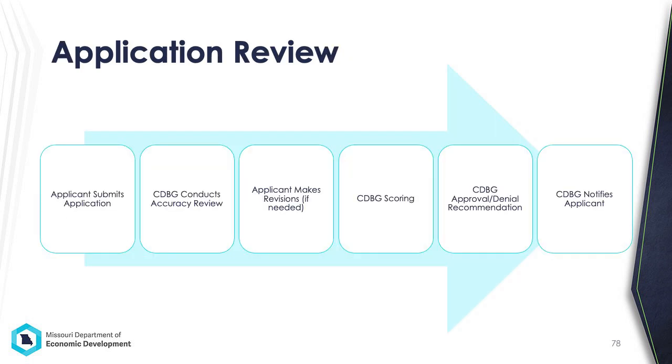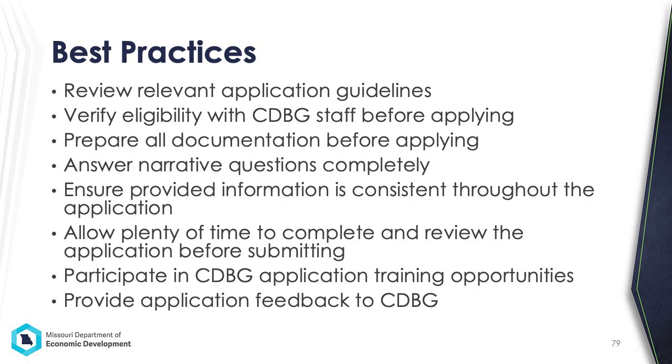With the exception of long-term recovery and emergency projects, projects will be scored by CDBG. Once the application is submitted to our office, it undergoes an accuracy review to ensure information is complete, accurate, and consistent. The applicant is given a brief window to submit revisions. Once all revisions are received, we move forward with the CDBG scoring process and the approval and denial recommendations. Those recommendations go up through leadership at the CDBG division and department levels for review. Once a final determination is made, we notify the applicant of the decision.